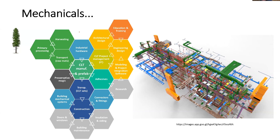Once we see the difficulties and prohibitions with customization and on-site fabrication of panels, you are suddenly in the business of thinking in a very new way about the mechanicals of the building. The BIM platform helps, but the mechanicals become part of your supply chain because you need to know ahead of time where they are going to come in order to be able to fabricate or finish the panels — something that most manufacturers of specialty glulam beams never needed to worry about.